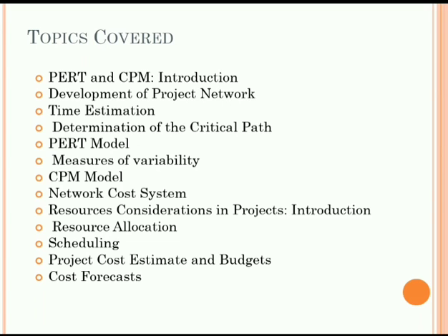The input for this will be the same as the output of the plan quality management, while the output of this process will be change requests, project management plan, then project document updates and organizational process asset updates also. Next step, that was quality control.